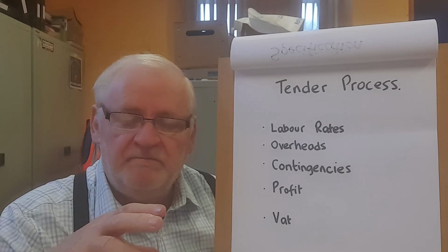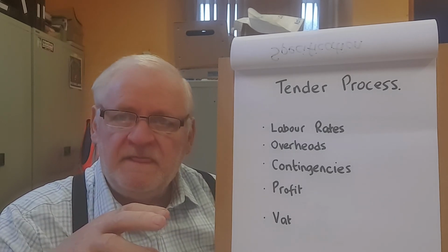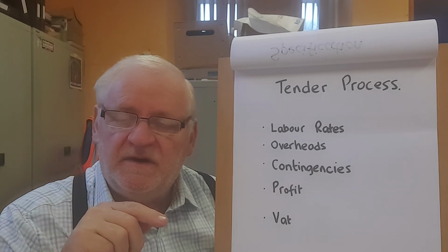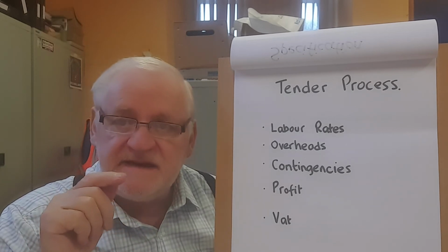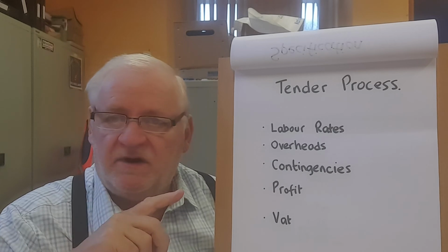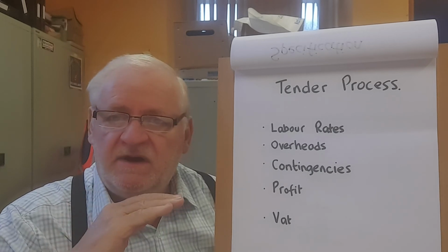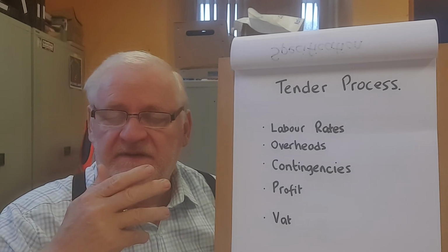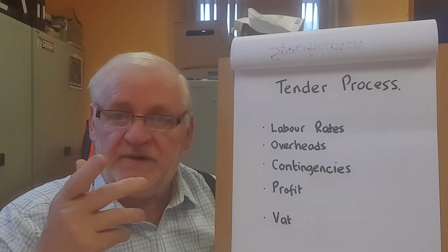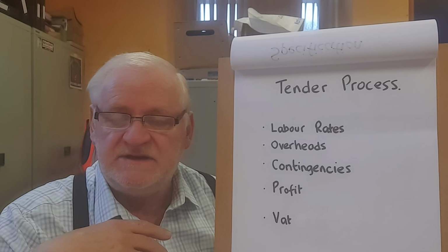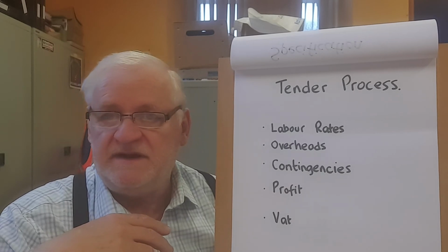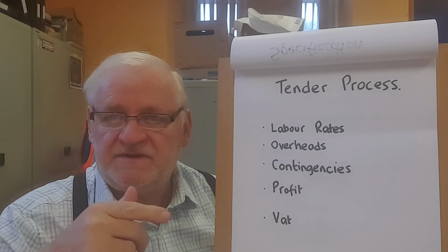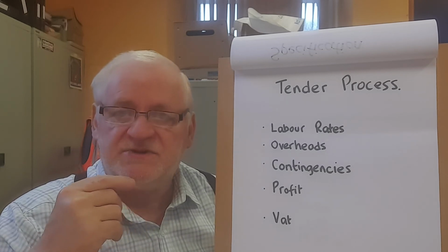And you'll say, well, a variation order is when you want to order me to do some work that was never anticipated at the beginning. It was never on the specification. It was never on the program of works. It's something that's happened, something that needs to be done that both you and I have never envisaged. No one ever thought that that would need to be done. So this means that there's extra work to be done, which means it's an extra cost.